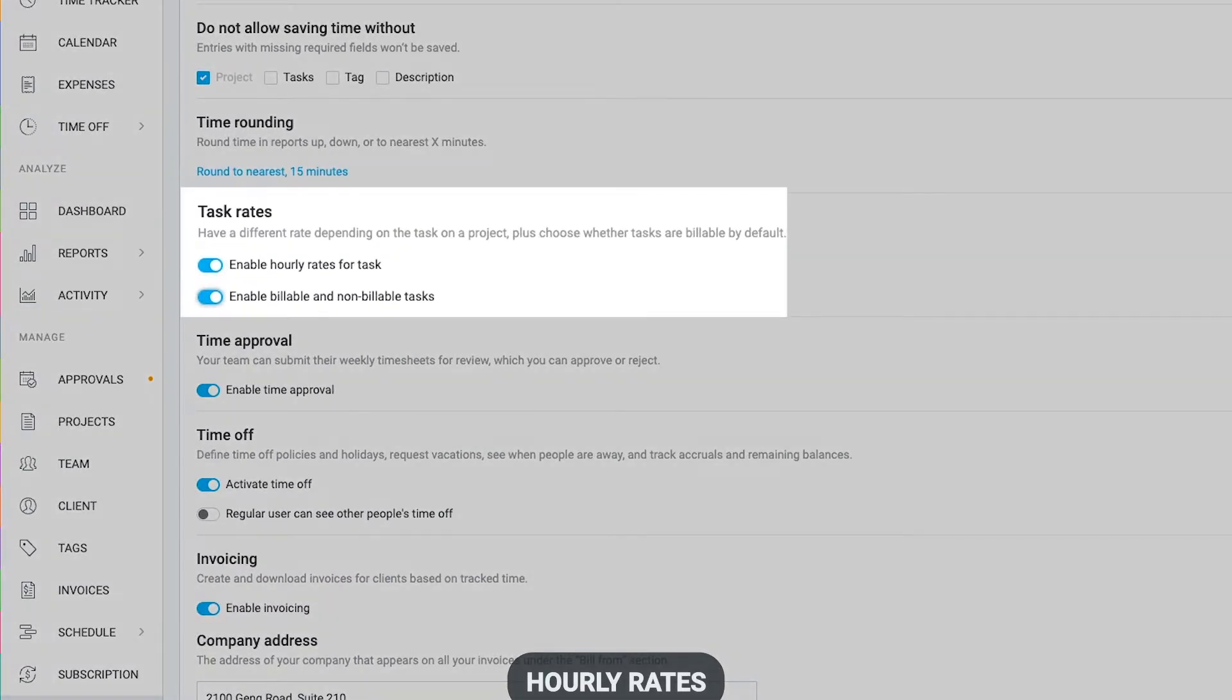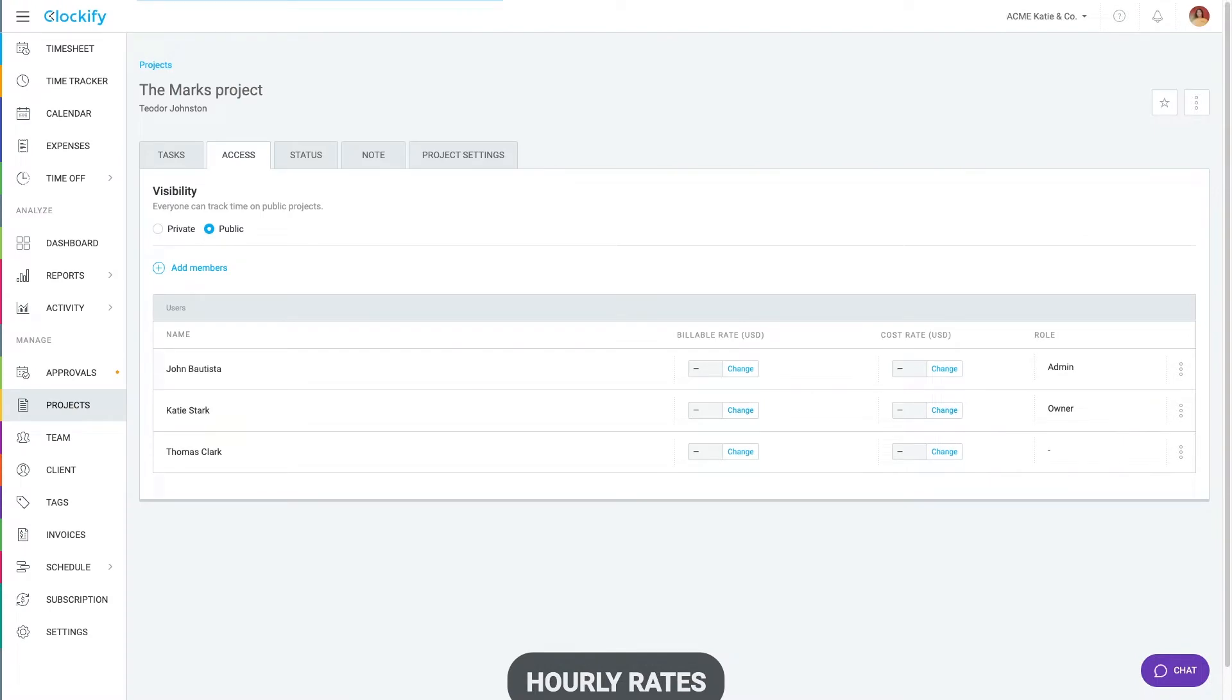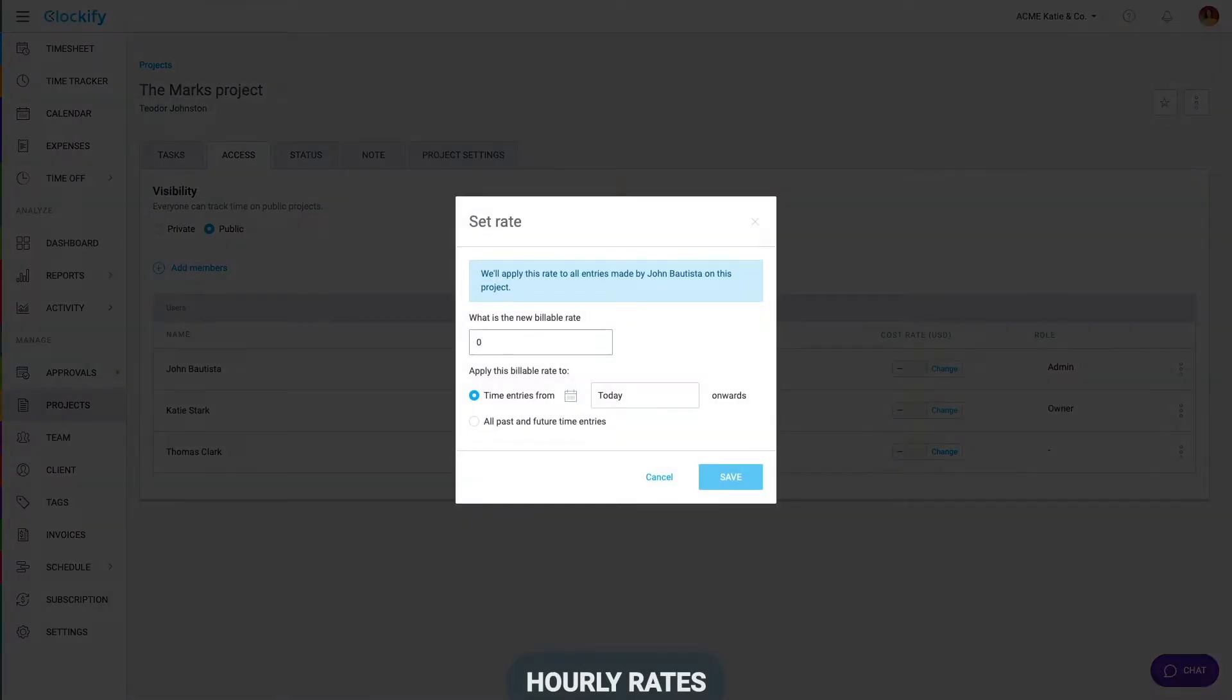And on the project's access tab, you can define an hourly rate for each member on that particular project.